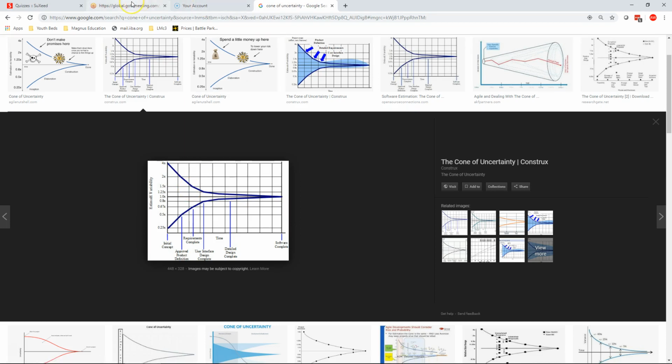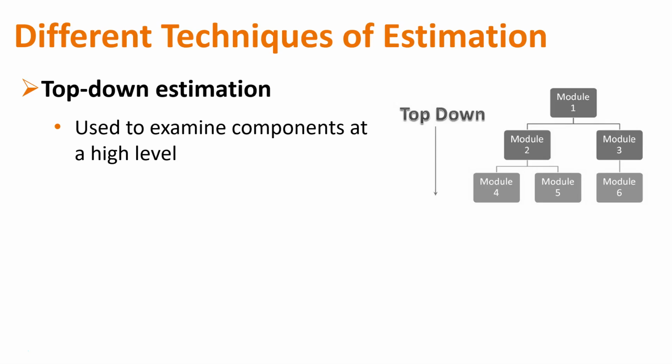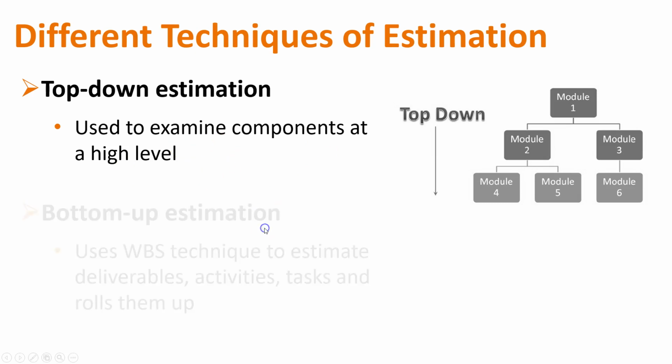And I took a 3-day, yes, 3 days, class on estimation. I don't know how you can talk about estimation that long, but it was always ranges. Never give a date. Never use the word about and a time frame. Never say, I think we'll be done in 2 weeks, or I think we'll be done August 1st. That's really, really bad to do. Sometimes you can't get around it, depending on the culture you're in, but ideally you don't.